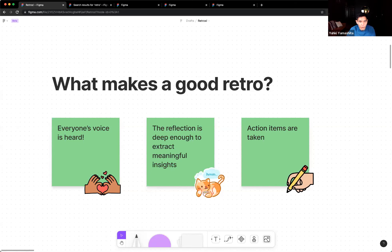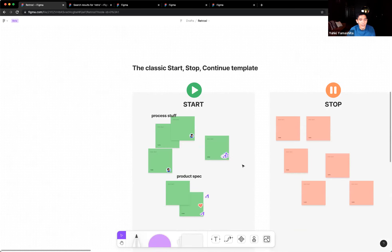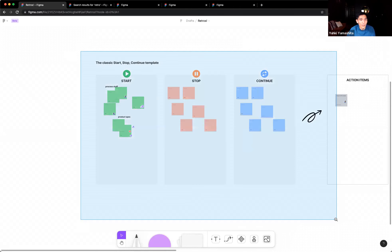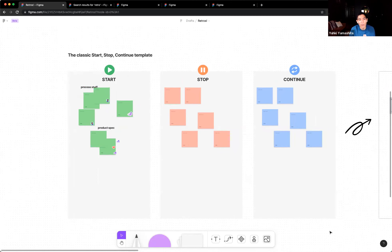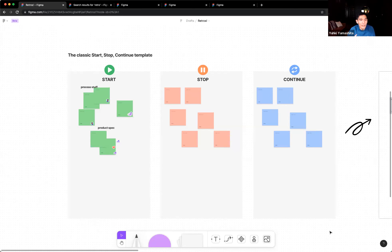I want to share the Start, Stop, Continue template, which many of you may be familiar with. It's really successful because it forces you to think about a given problem from different perspectives. 'Start' covers ideas you've had and wanted to try out. 'Stop' covers things that aren't working that you want to voice. 'Continue' is an explicit acknowledgement that something is working and you like it. If you apply this framework to any project or topic, it's pretty collectively exhaustive in bringing all perspectives to the room.